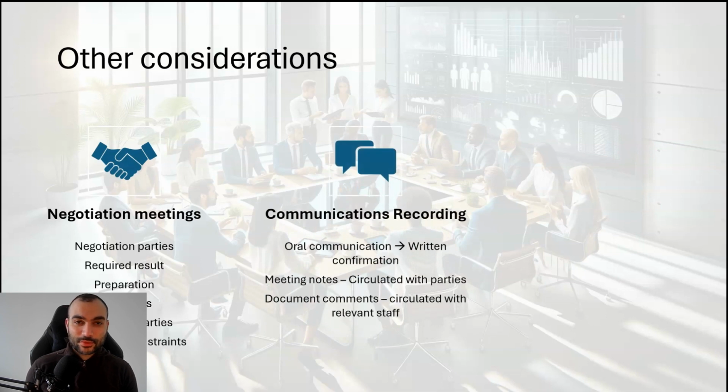And communication recording, that ties up with what we have discussed before. When you are undertaking oral communication, you have to document it somehow, and construction contracts oblige construction parties to have a written confirmation for that verbal communication within a specific number of days. When you're entering a specific meeting, it's quite important to document what is happening in that meeting in the form of notes, which are circulated to different parties.